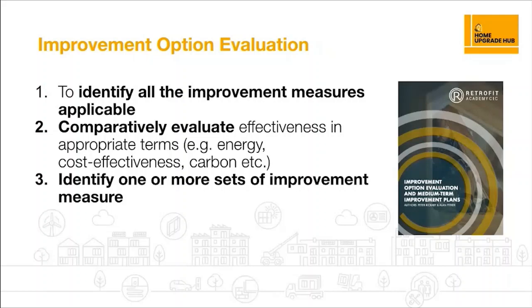This will be done by the roles supporting you, so your coordinators, and it's done via modelling usually in SAP or passive house planning package. It can't just use RDSAP data, which is what gets used usually for an EPC, so that is going to require that to be upscaled. Again, there are software solutions to assist with that. And also I think you'll find there is some useful guidance out there if you are interested in understanding what that particular stage involves in more detail. There's a Retrofit Academy guide which is available on the website.